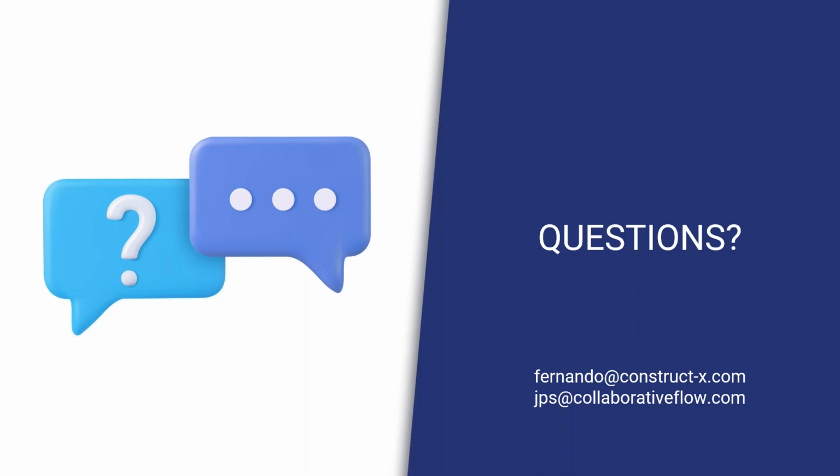So yes, on the milestone side, how do we enter with milestone phases and all that is part of the path of construction exercises, by looking at the big chunks of work at the CWP level, right? And then driving that, maintaining those absolute dates of starting, even though they'll probably shift a little bit, but those should be our cues to aligning our IWP development, scoping and sequencing activities to fall within those milestone dates. So there's quite an opportunity there for sure. Go ahead, John.